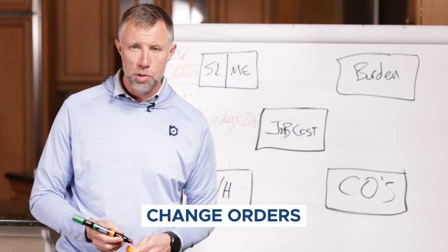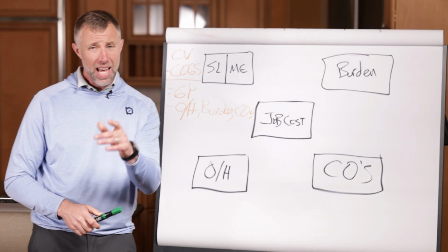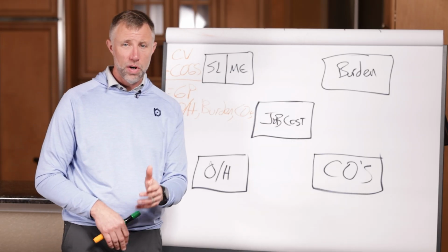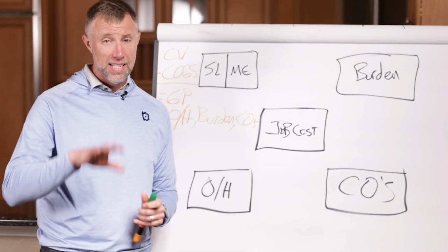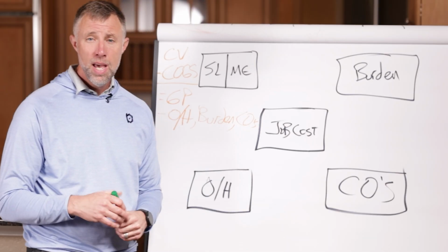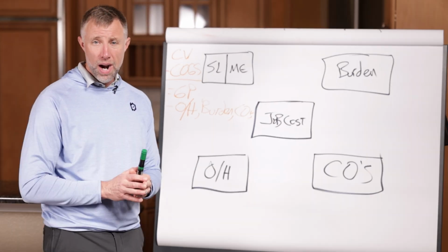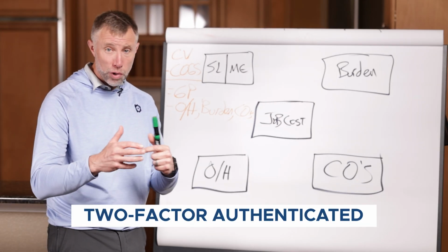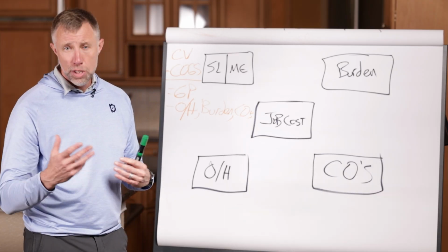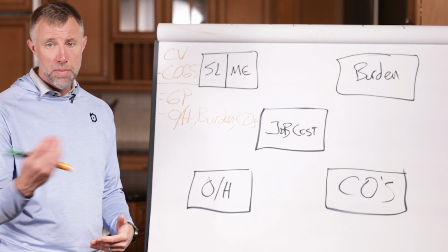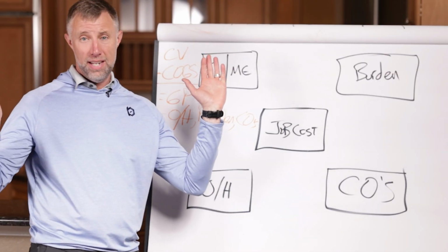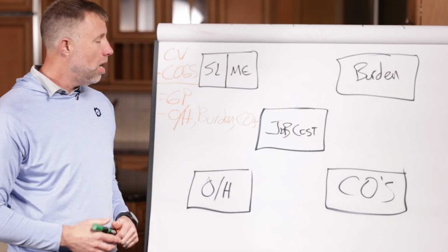You guys know what those are. There's plenty of change orders that come through. And a lot of times, unfortunately, those change orders are done on kind of a head nod and a handshake. We've got to be very careful not to do that. It's actually another way software can come in and play, to make sure that all change orders are actually signed off and two-factor authenticated between the two parties, to make sure there's agreement before we spend the money and the labor to go install that thing that somebody goes back and says, I didn't call for that. And we're like, nope, we did. We signed it on both sides.